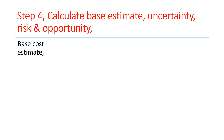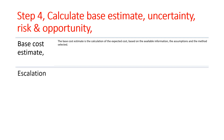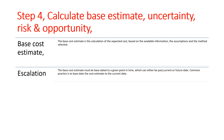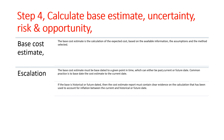This step is the core of the cost estimating practice, where the key components of the cost are quantified. Base Cost Estimate: the base cost estimate is the calculation of the expected cost, based on the available information, the assumptions, and the method selected. Escalation: the base cost estimate must be base-dated to a given point in time, which can either be past, current, or future. Common practice is to base-date the cost estimate to the current date. If the base is historical or future-dated, then the cost estimate report must contain clear evidence on the calculation that has been used to account for inflation between the current and historical or future date.